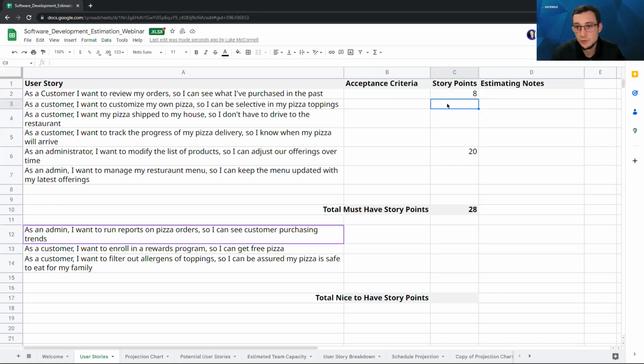Yeah, I think so. So typically it depends on how your team wants to go. Do you want to keep talking about it to see if you can narrow down if there's something else you figured out? Or do you say, hey, we're pretty good right here. That's where the majority have landed. We're going to land there. Also, sometimes if you just can't decide, we recommend maybe bumping up to the higher one, just because that means that you're probably in a more safe place when you get to your forecasting process. Yep. But for sake of estimation, let's put the 13 here. I like it. And move on to the next one.